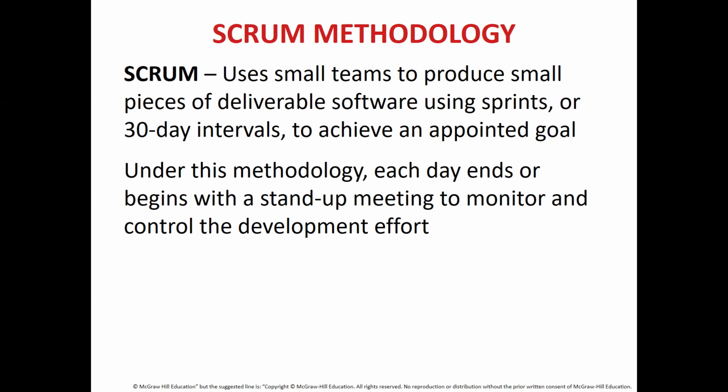Under this methodology, each day ends or begins with a stand-up meeting to monitor and control the development effort. A stand-up meeting is when, right at the beginning, you have a team leader or project manager who comes in and briefs the team: this is what we need to do today, we need to get this designed, we need to get this tested, and by the end of the day, let's do a catch-up. So come COB, close of business, or end of the day, the entire team gathers again, and people give their report on what they were able to do, whether they were able to meet the demands for the day or not.